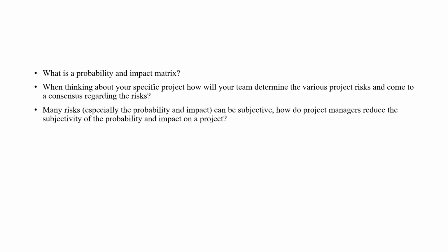And then formulation and implementation of a risk management plan, like allowing contingency funds, management reserve funds, hiring new resources, machineries, tools, etc. And then regularly conducting a follow-up session for all these points. And the last one is many risks, especially the probability and impact, can be subjective.